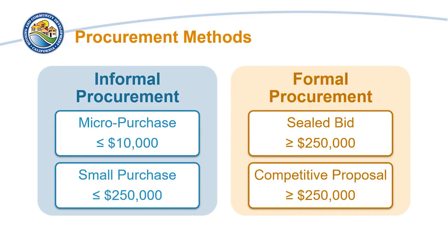There are four allowable methods of procurement: first, micropurchases; second, small purchases; third, sealed bids; and fourth, competitive proposals. Micropurchases and small purchases are referred to as informal procurements, whereas sealed bids and competitive proposals are referred to as formal procurements.